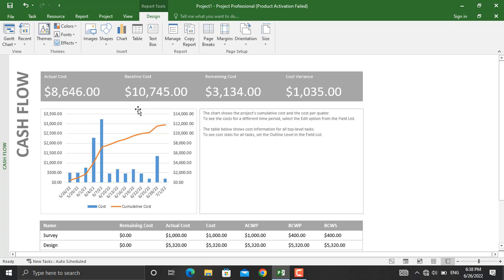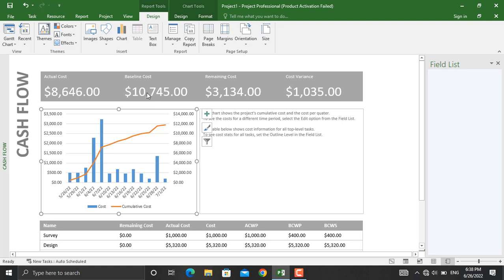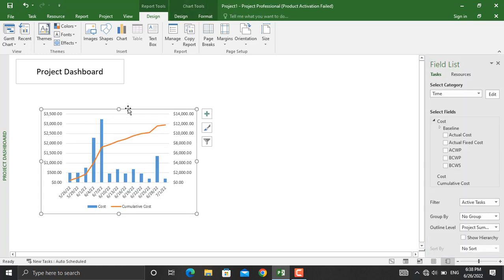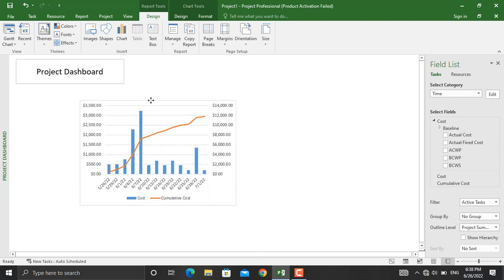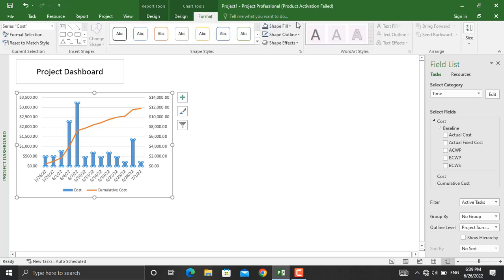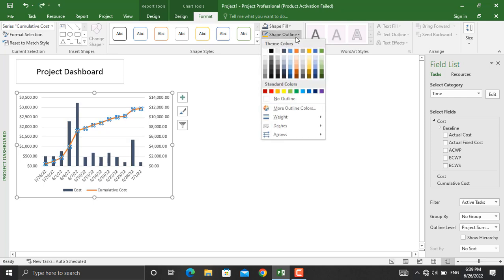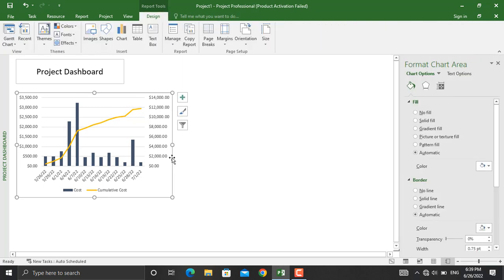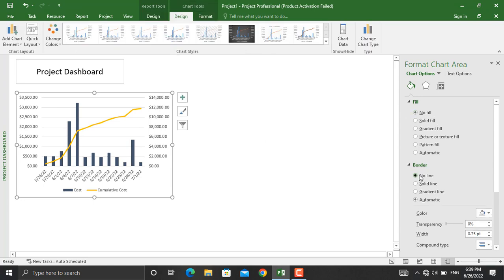This report will be automatically generated. In previous videos we discussed in detail how to prepare a project cash flow diagram in Microsoft Project. I'll copy this chart using Ctrl+C, then go to the recent reports and open the Project Dashboard we just created, and paste it there. If you want to do some formatting — for example, change some colors — you can do it as we did in Microsoft Excel. Go to Format and in Shape Fill select a different color. For the cumulative cost line, go to Shape Outline and select a different color. Next, to remove the borderline from the chart, double-click it and select No Fill and No Line.